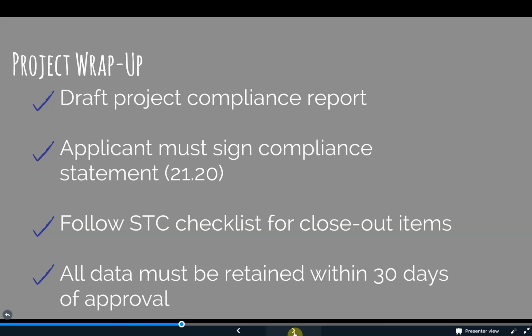Show compliance with all applicable requirements and must provide the FAA the means by which such compliance has been shown, and B. Provide a statement certifying that the applicant has complied with the applicable requirements. The Project Compliance Report is accomplishing both of these objectives.